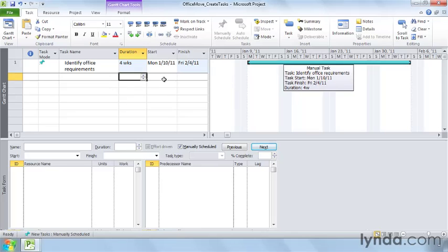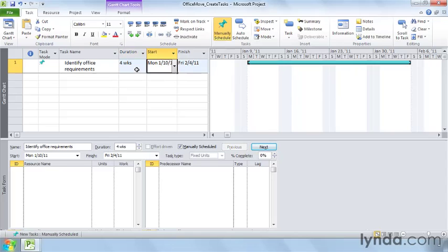Because you provided 2 values, the start date and the duration, Project calculates the finish date for you. The black bracket at the finish date of the task shows that. The question mark on the task mode icon disappears as well because the task duration and date info is now complete. Project has another look for manually scheduled tasks with duration but no dates.